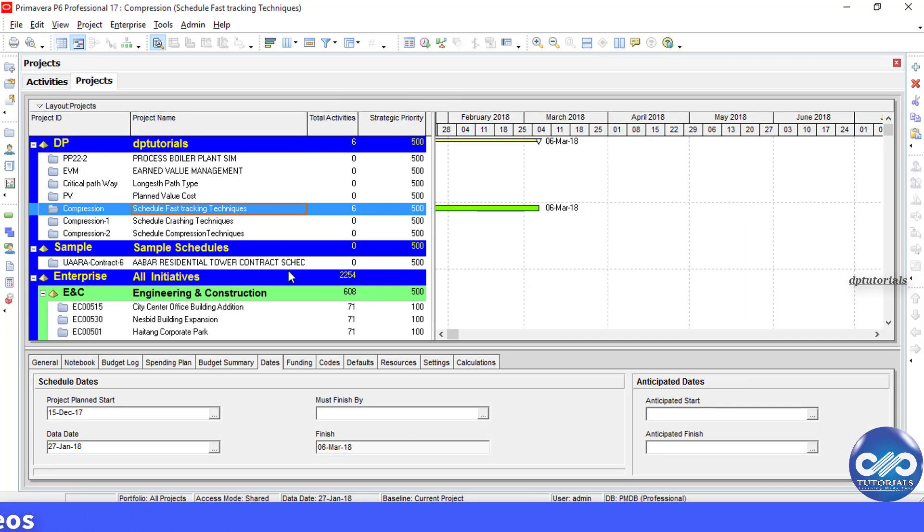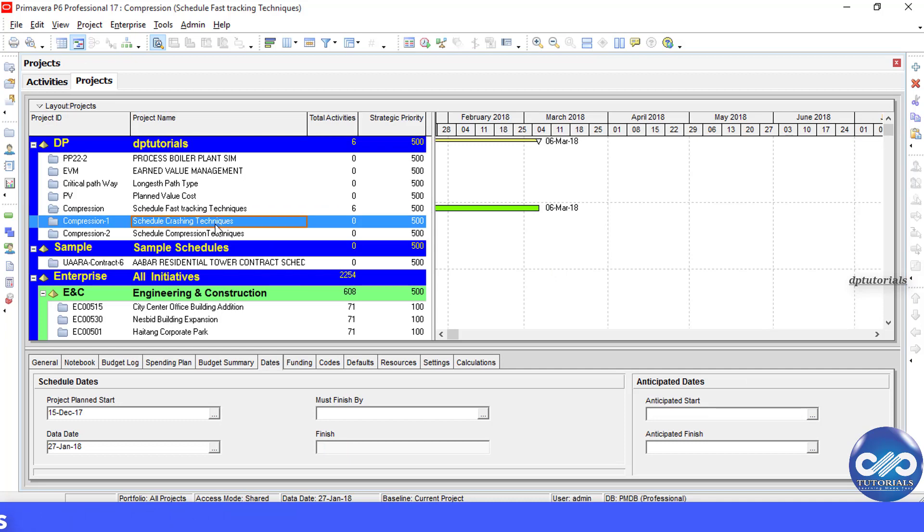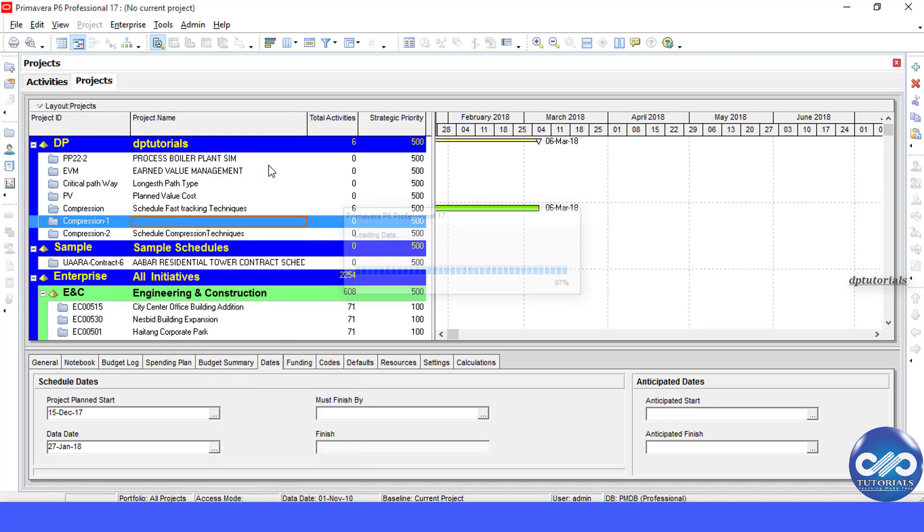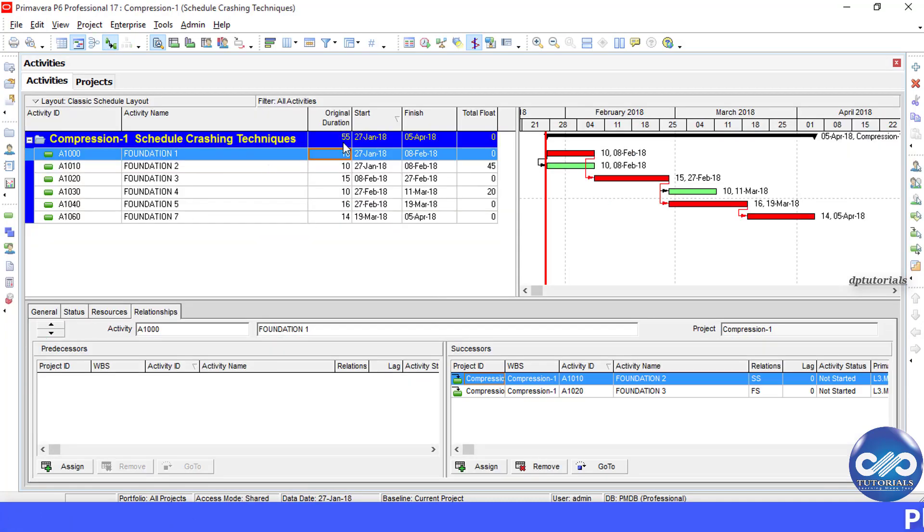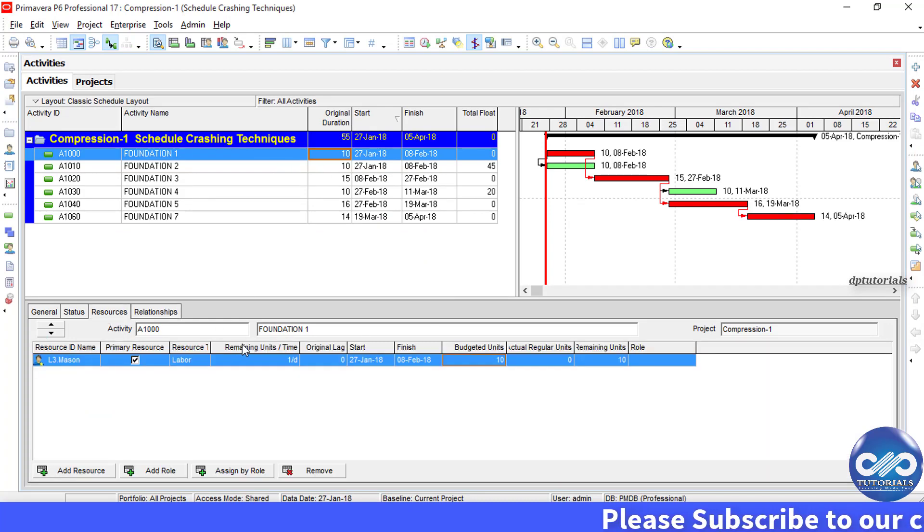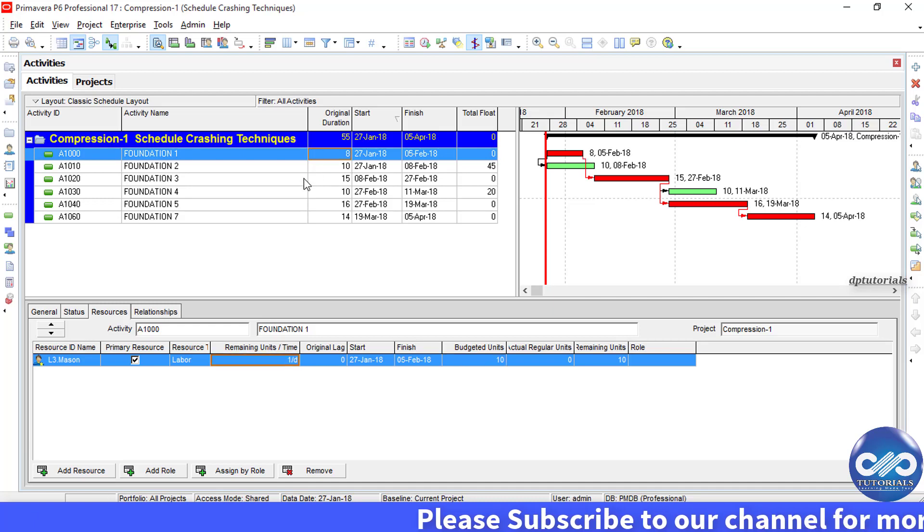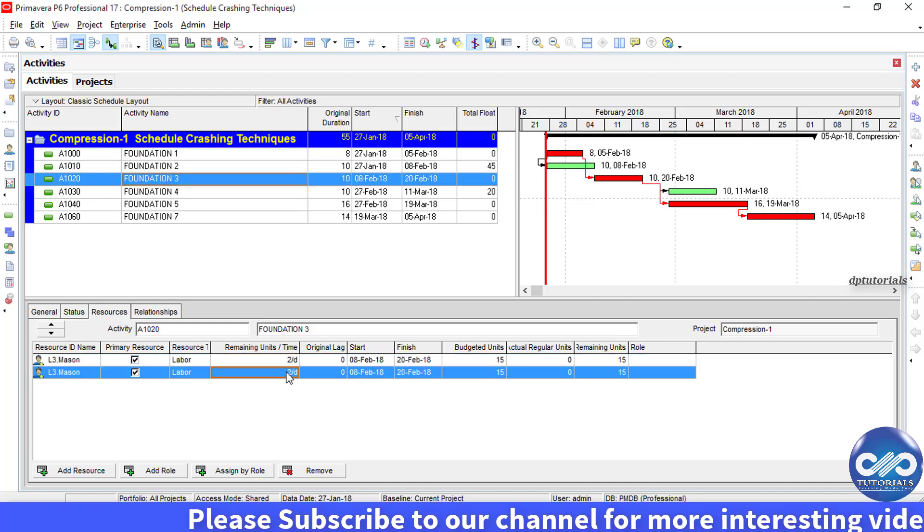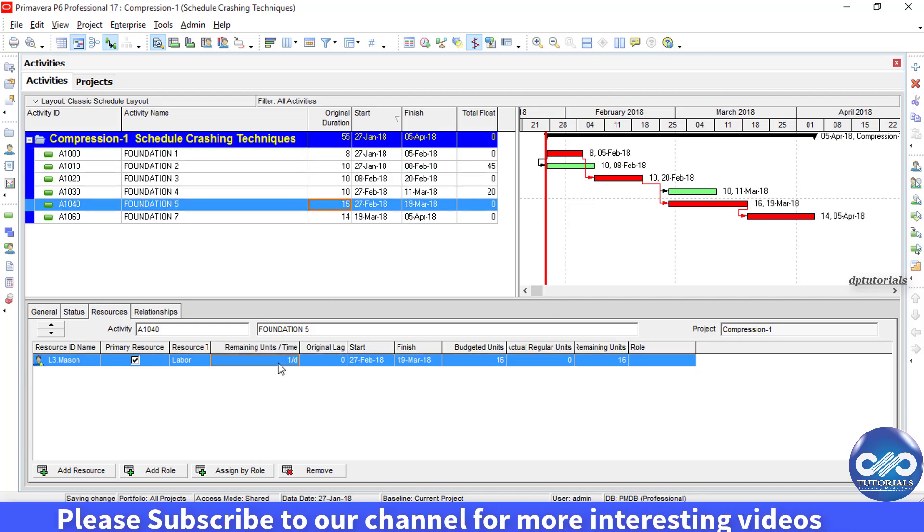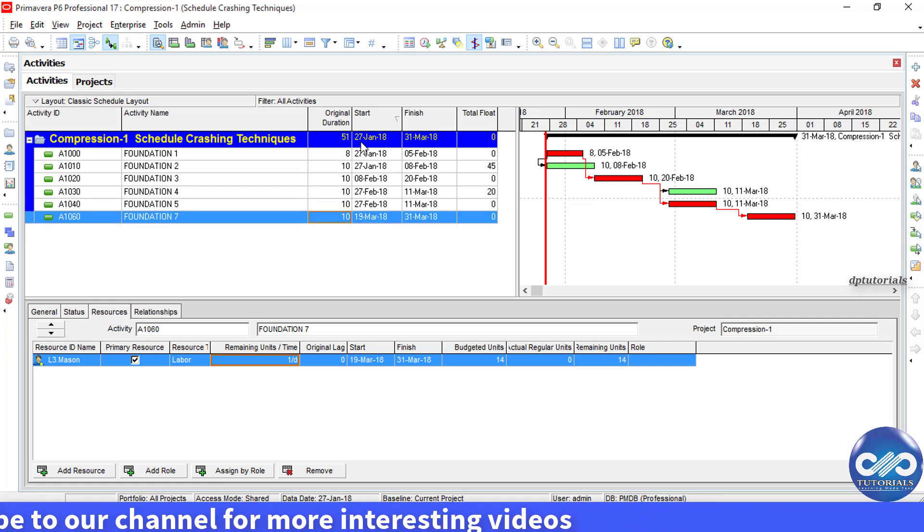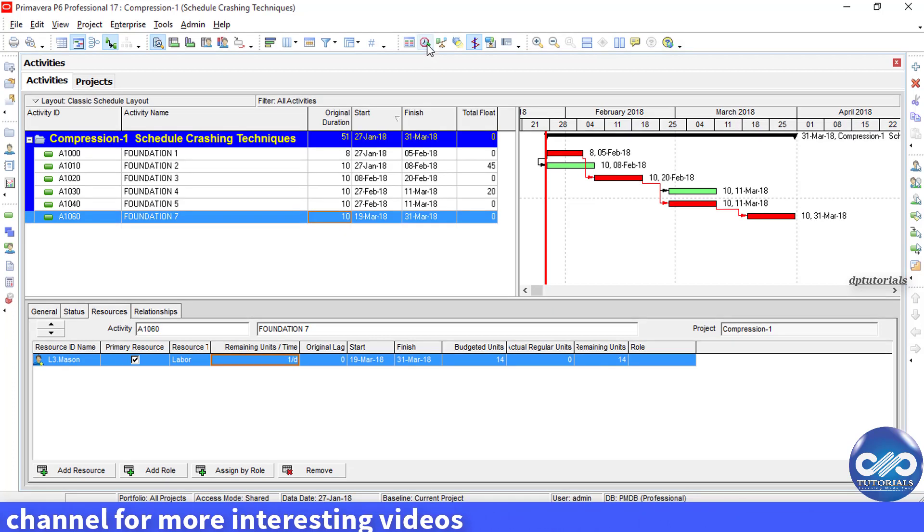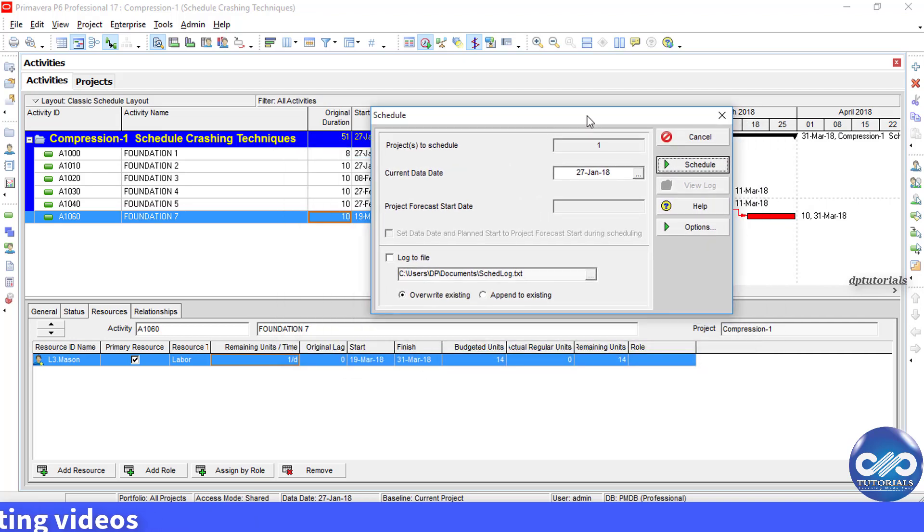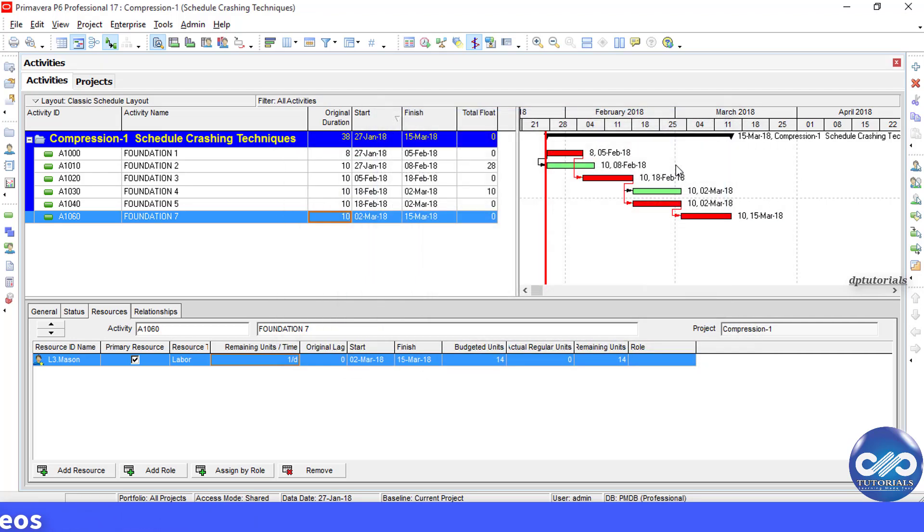Now let's carry out the crashing technique. Here the original duration is of 55 days. Now let's increase the resources to some of the critical activities. Then schedule the project. You will notice that the project duration has been reduced to 38 days.